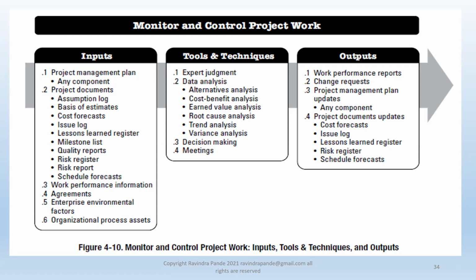Then of course the risk register. Whatever we've assumed, we've added to the risk register, and we do a review of this risk register, and we generate a risk report for a specific time on a specific day. And with this risk report, we need to understand, are we changing anything? Are there any new changes to my project plan, change requests to be added to my project task, activity, and so on and so forth.